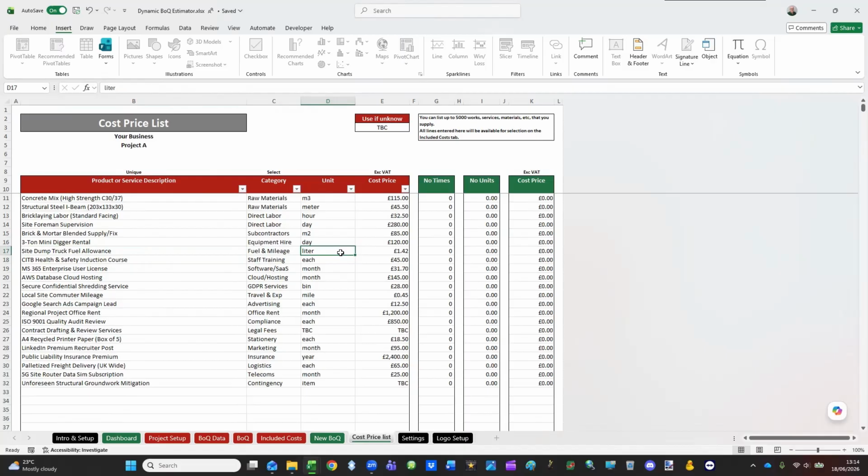And this is incredibly important. And I'll tell you why this is incredibly important. It's because later on, you're going to be able to look at it and go, well, if the customer wants, for example, 3 cubic meters of cement, what does that relate to in staff hours, for example? So it's going to tell you what you're costing in and what the bill of quantity requires so that you can make sure that the two match up, because you're not necessarily going to be costing in square meters against square meters. Sometimes you will, but sometimes you'll have to put, for example, time versus size or whatever the case might be.